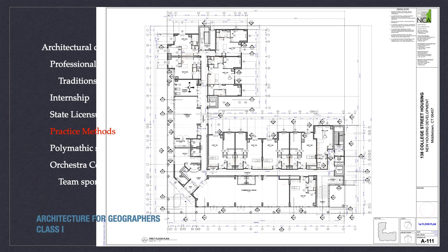The final design phase is called contract documents, and the audience for these documents are the construction companies bidding for the opportunity to build the project. Every design decision needs to be clearly documented so that disputes between the owner and the ultimate builder as to what they bought are minimized. A usual standard of care is to budget for 2% of the construction cost for changes to the contract, which is really pretty tight considering that each building project is a one-off, and they take several years to complete, so unforeseen things that impact the project cost happen all the time.